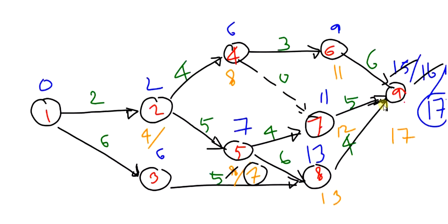Now we can find out the TL of event number 2. So what will be event number 2 from 5, the path 7, 5, 2. Here for the 5th node, it is 7. 7 minus 5 will be 2. Here it will be 2. Okay, so here also we have two values, 4 and 2. We will be considering the smallest one.